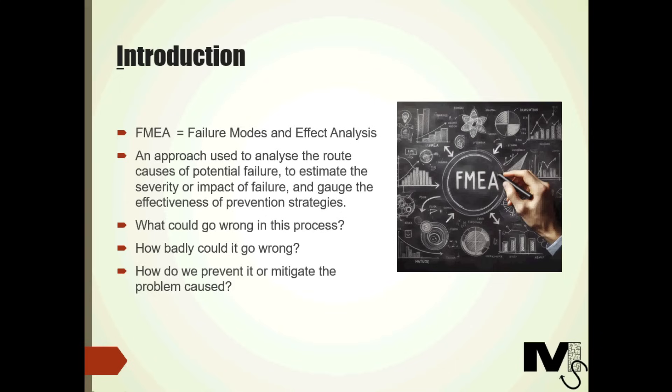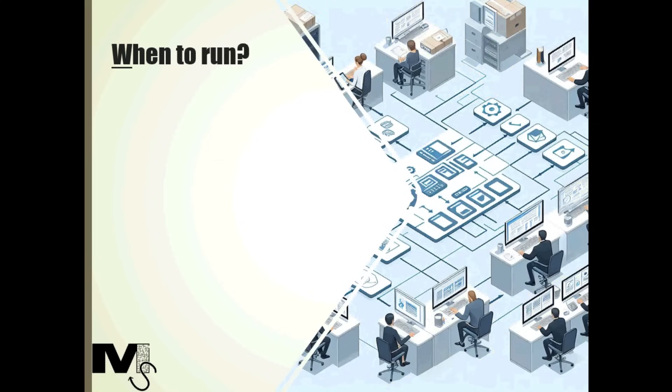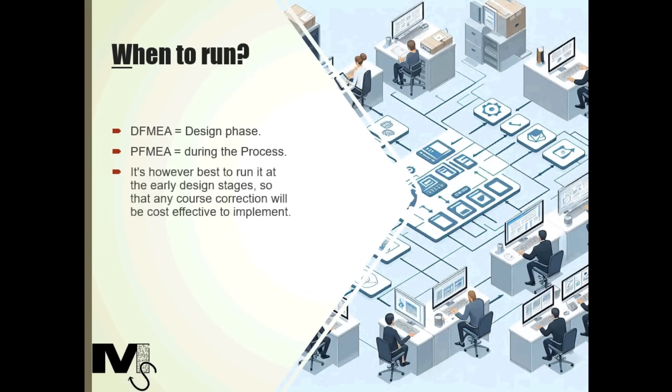Now let's look at when companies or teams typically run FMEA. FMEA can be used during the design phase to prevent failures in the product, project or process. Here it is called DFMEA or design FMEA. It can also be used during the process to improve the process and avoid further problems. Here it is called PFMEA or process FMEA. It is however best to run it at the early design stages so that any course correction will be cost effective to implement.